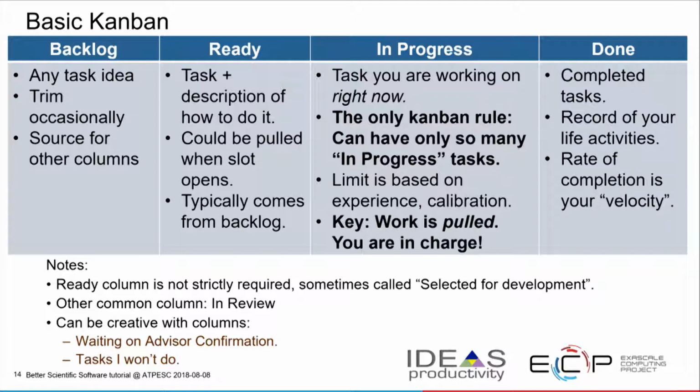Okay, these columns, I'm sorry. You can add other columns. You can experiment with this a little bit. So another common column in many cases is some kind of in review, right? So if you're producing things and somebody needs to check the work to make sure it's okay, or if you use code reviews to gate contributions to your software repository, you might want to have an in review column.